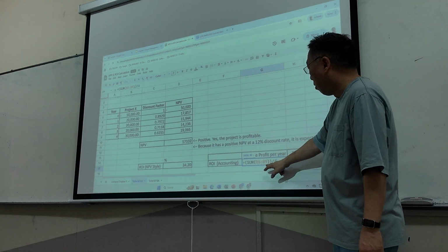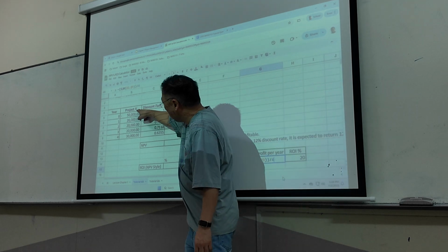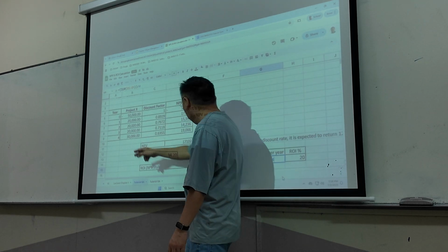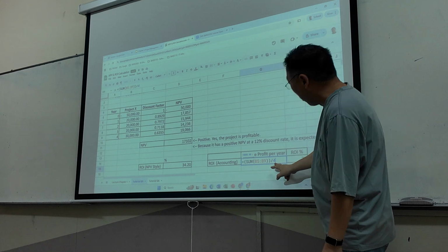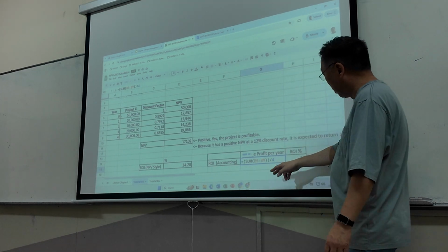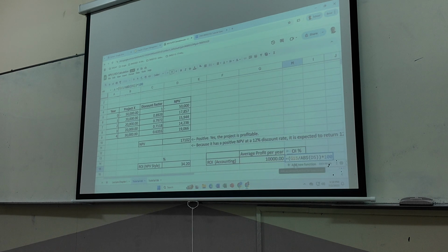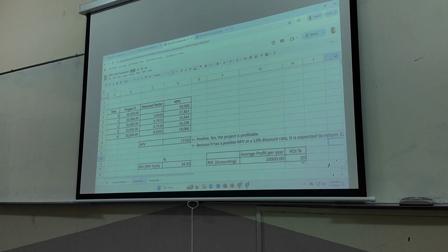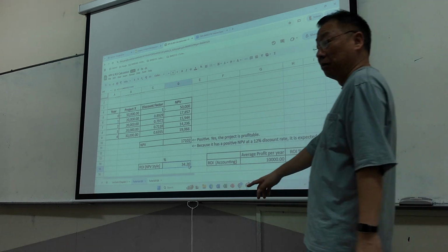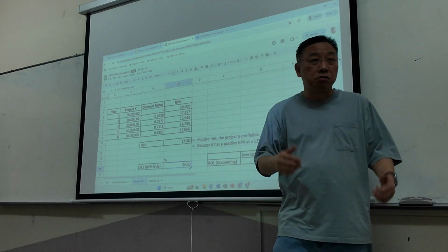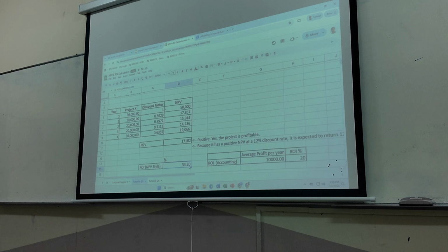Take your profit of this, without taking into account NPV, divide it by 4, which is the average profit per year, then you get $10,000 per year, the average profit. So your ROI is, let me see here, 10,000 divided by your 50,000 investment times 100, so you get 20%. Okay. But this is the NPV style of calculating your ROI is more accurate. So this says that, oh, your ROI is very good, 34% return.